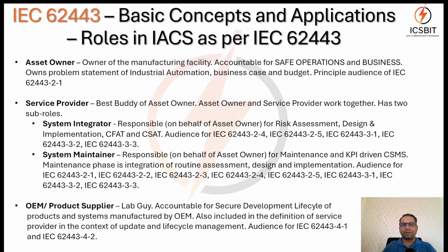So the complete life cycle from assessing the IACS till commissioning is handled by the system integrator. He starts with the business case, then if the asset owner has multiple factories, he defines a sample of factories for initial risk assessment. That is very important to collect evidence to formulate the business case, and also to measure the present posture and put a correct proposal in terms of technical and commercial.